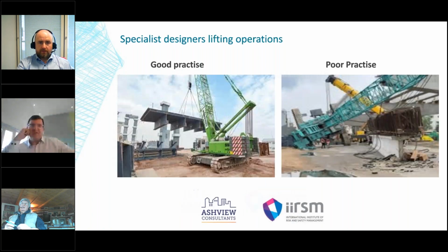Thanks, Paul. Just on the transportation, there's the whole logistical part of the site, which Paul will allude to, and the pre-planning during the design risk management process or the pre-construction of how the actual site and the set down areas are going to look. So the transportation is getting the panel in as one, but then when it gets to site, how many trucks? Is it just-in-time deliveries? Is it three 40-foots at a time, that the site is ready for? But Paul will allude to that, as that's another element to it. Sorry, go ahead, Paul.